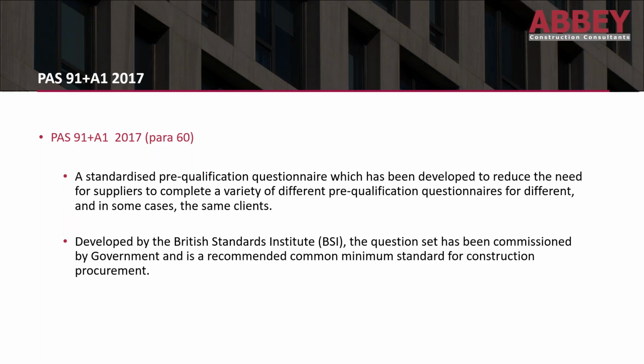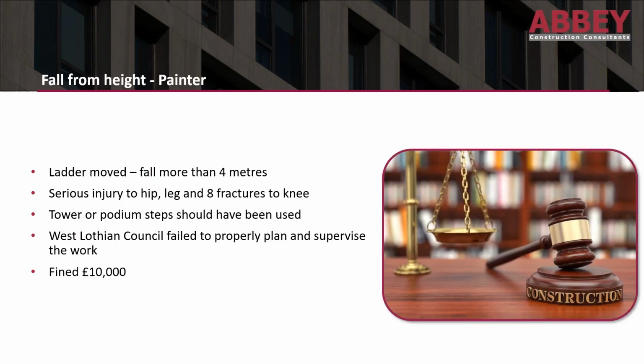It was developed by the BSI, British Standards Institution, and the question set has been commissioned by government and therefore is a recommended common minimum standard for construction procurement. And it's free to download. You could write your own questionnaire from that, which means you're meeting both BSI and government standards.